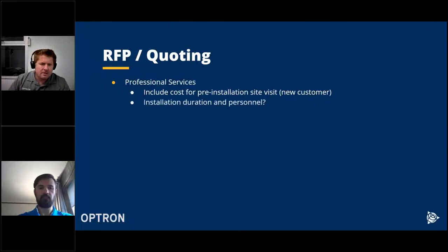We need to look at your installation duration and personnel. It's always quick to say, yes, I can give you a quote quickly, there you go, installation is included. And you maybe costed for 2 days of installation, and when you start actually planning the installation, you see that this is going to take like 5 days or so. So you need to be clear before you do your quote that you know more or less how long the installation will take.